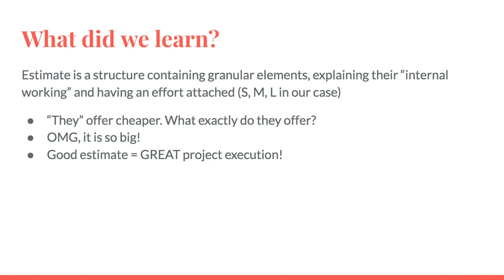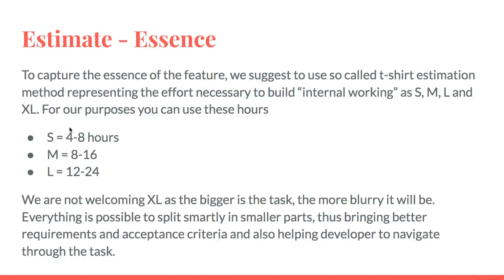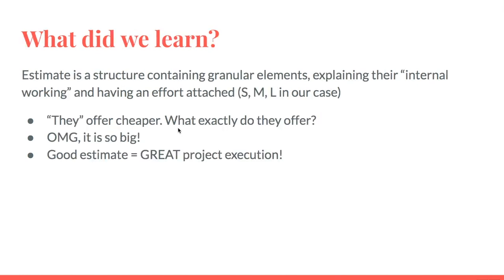Yes, and I understand that's our last slide, right? So we learned that the estimate is a structure containing granular elements, explaining their internal working and having an effort attached to deliver them: small, medium, or large. And please put hours so we can sum them up and see, and put a range from 4 to 8, 8 to 16, 12 to 24.